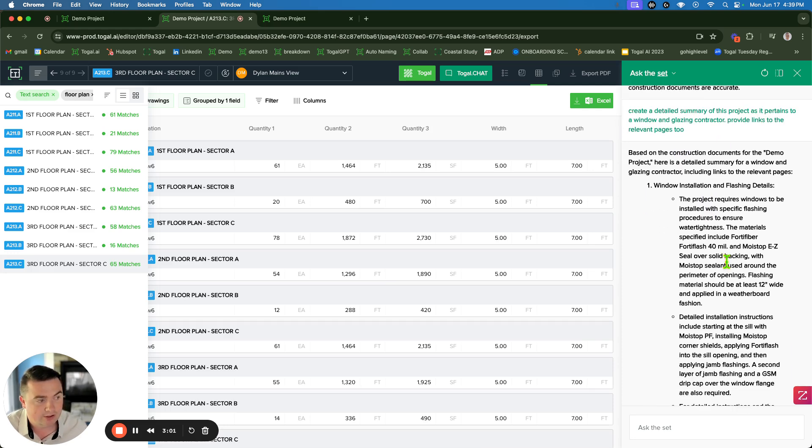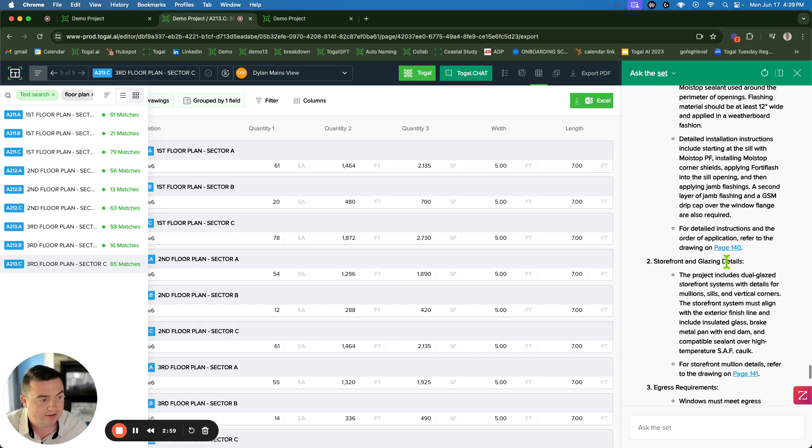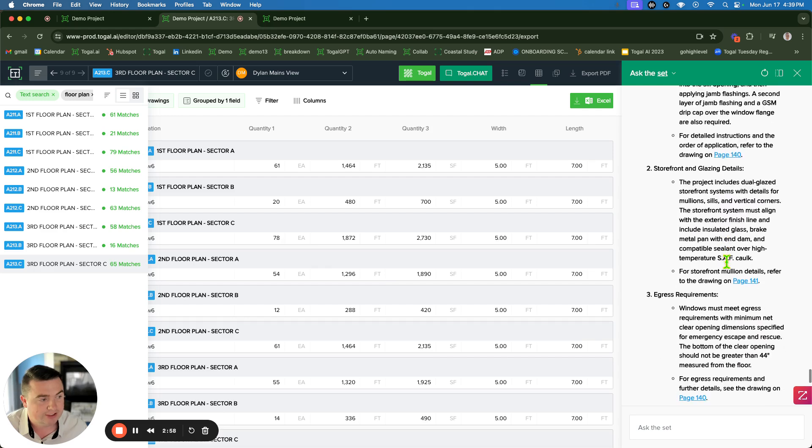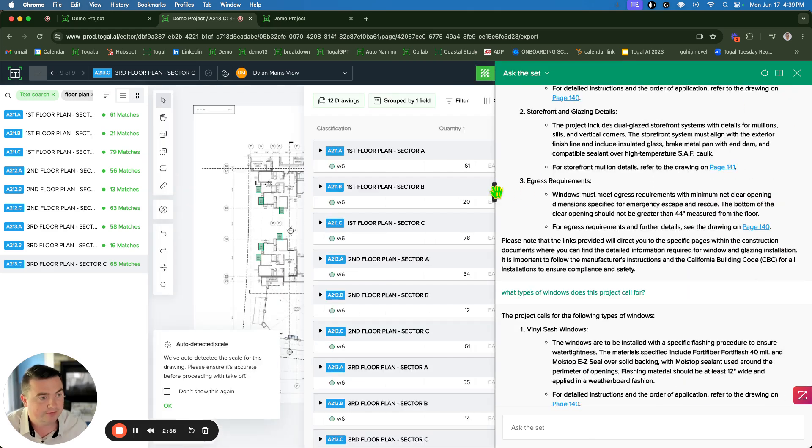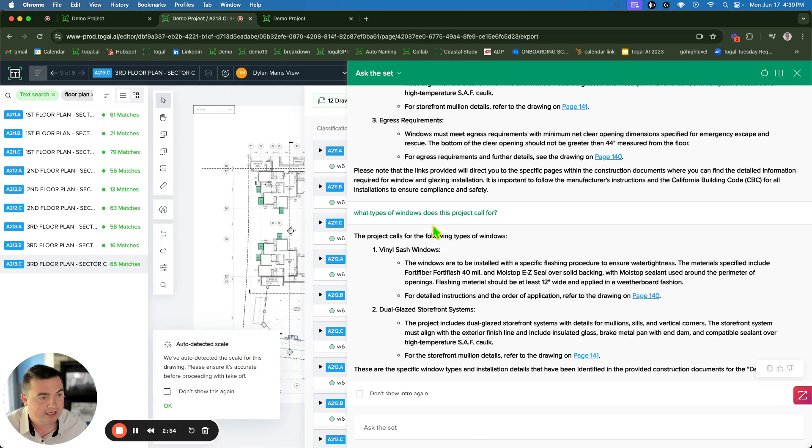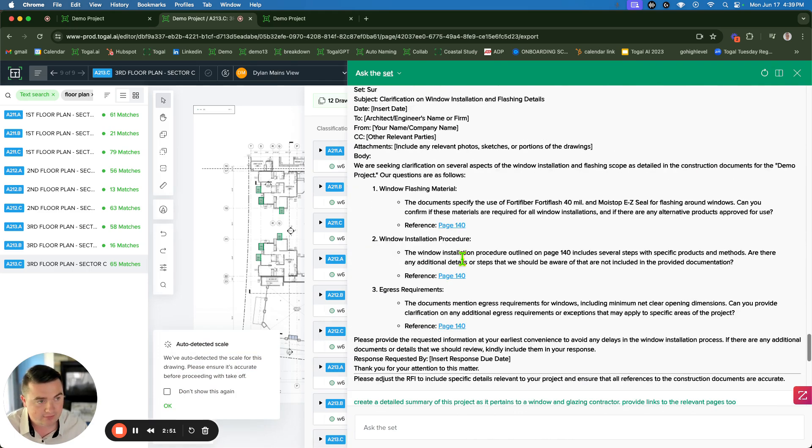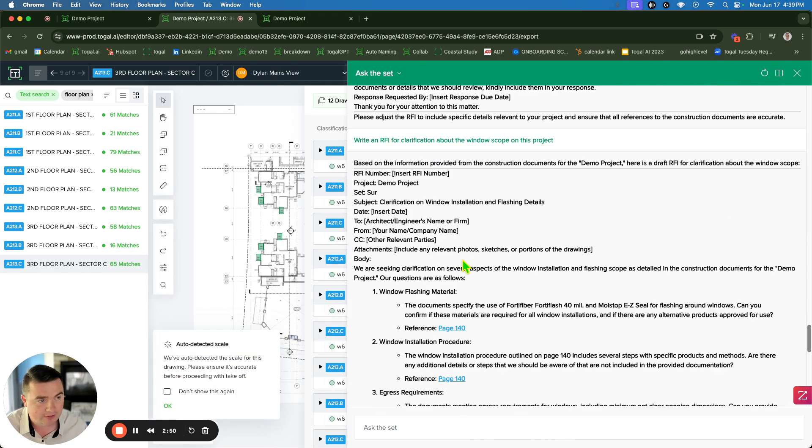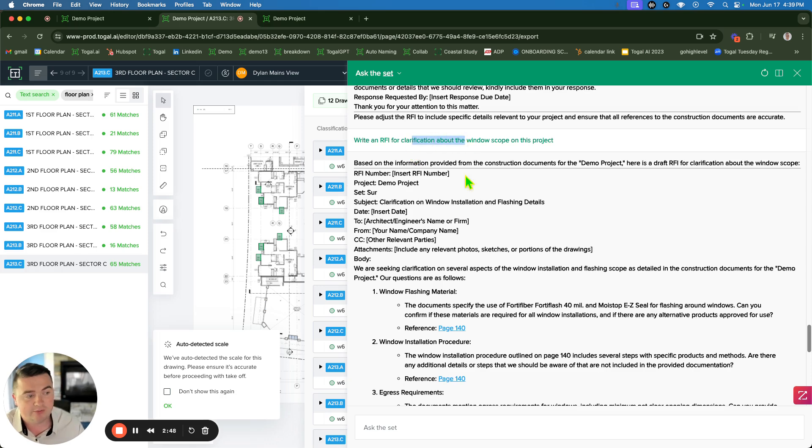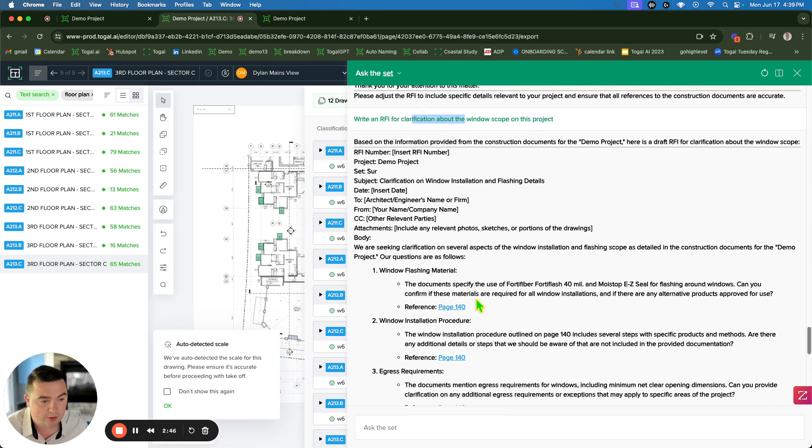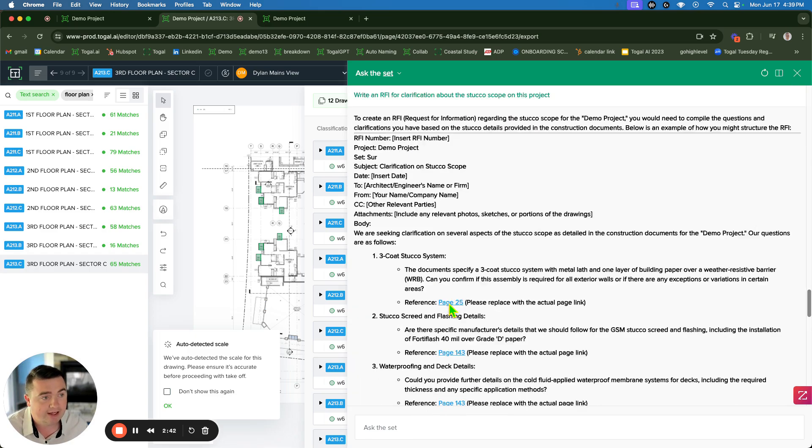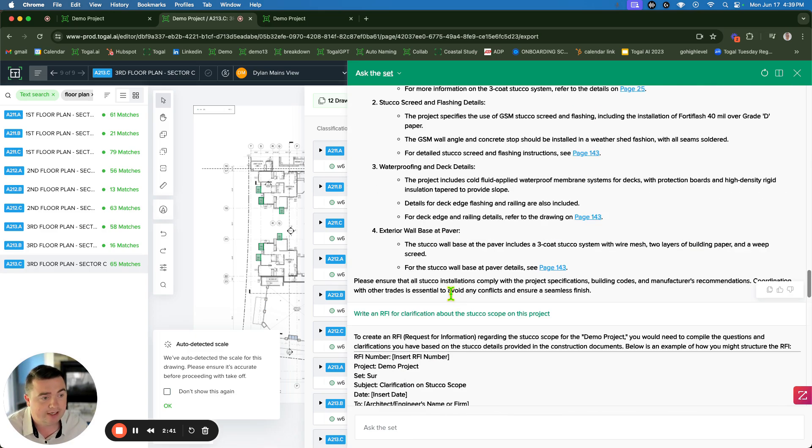So here I've asked it to make me a summary of this job for a window contractor. It tells me about the window installation instructions. There's some storefront on this job. I asked what type of windows, we got vinyl windows in this job. Up here, I said, make me an RFI for clarification of the window scope. It goes through and figures out what things are missing in the window scope. This project here from the plans tells me about that.